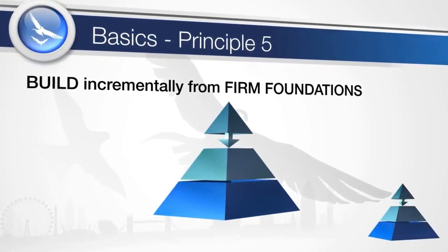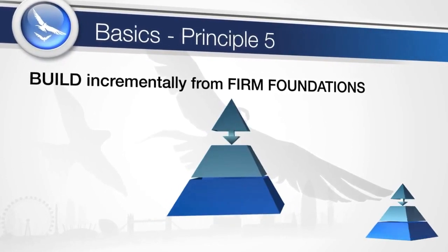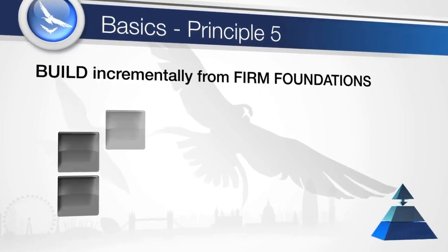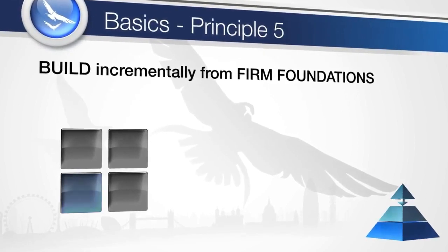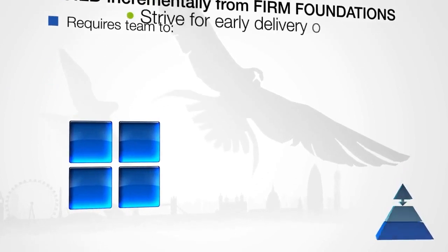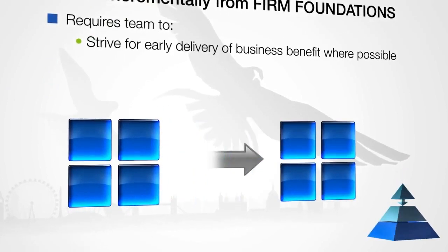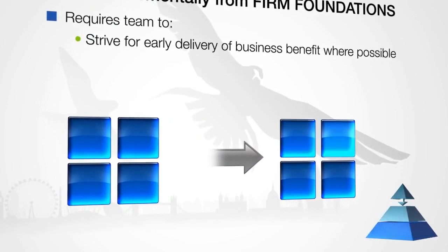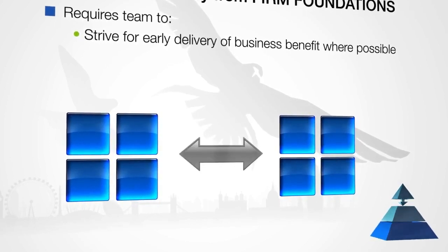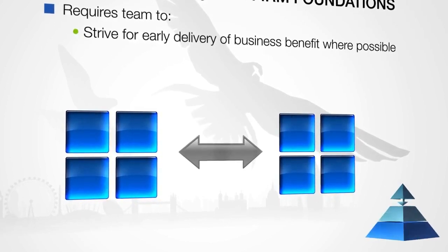In order to deliver real benefit early, Agile Project Management advocates incremental delivery. A series of releases is referred to as increments, with each increment providing more functionality to the business. After the first increment, a core product is delivered, which can already be used by the customer. This encourages stakeholder confidence and creates feedback for subsequent increments.